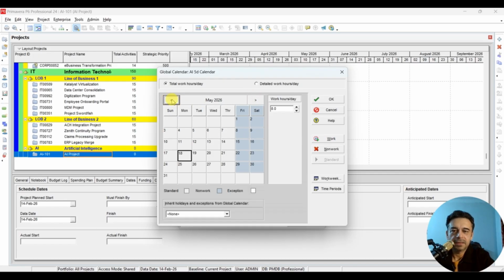Okay, this change is throughout. So that is the first step. Second step is that, okay, this is the standard setting that we have done, that we have 5 days in a week as working days and Friday and Saturday are off. But let's say that next month we will have some special holidays, for example any festival or any other event. So we will have let's say 5 days off.